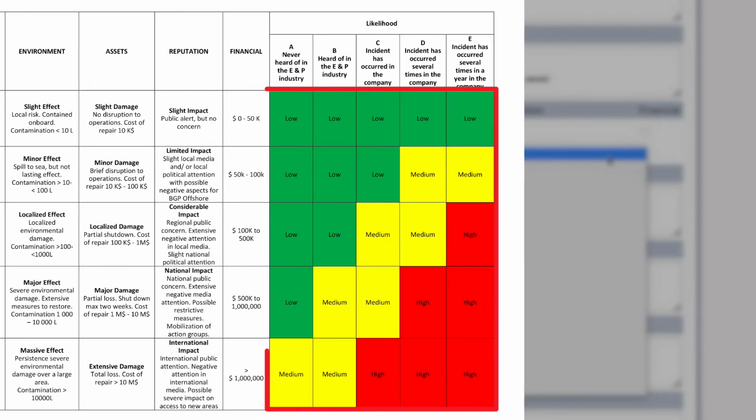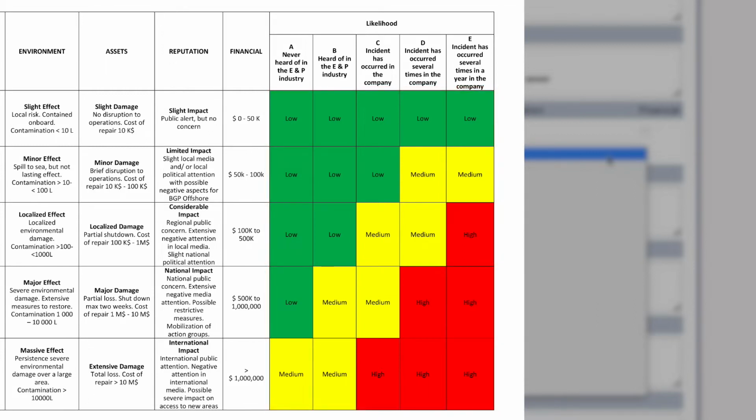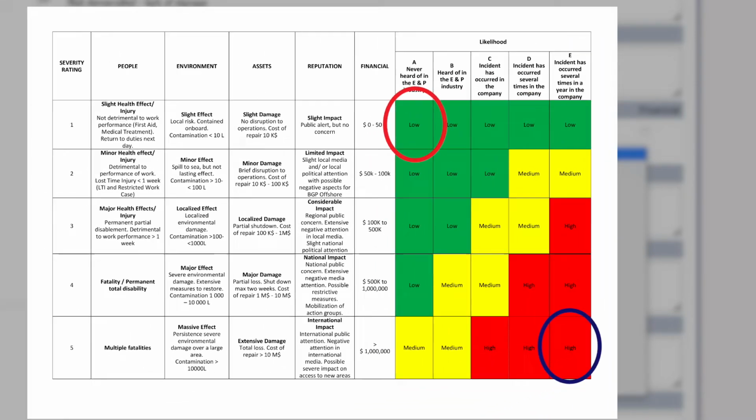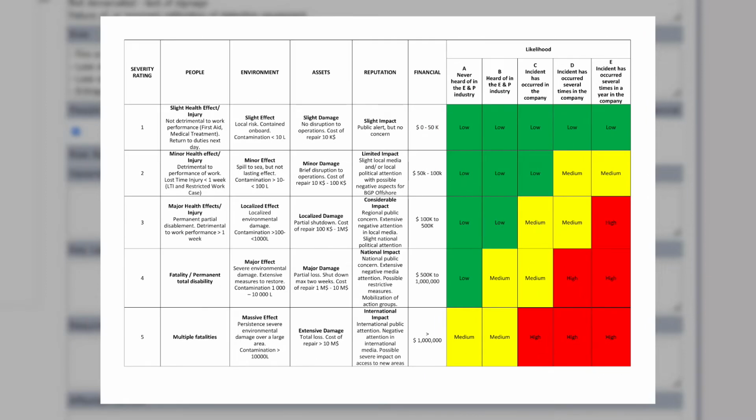Risk rating. Once the severity and likelihood have been identified, the risk level can be determined from the risk matrix. As shown in the matrix, risk ratings can range from A1, lowest risk, to E5, highest risk. The purpose of risk evaluation is to assist in making decisions based on the outcomes of risk analysis about which risks need treatment and the priority for treatment implementation.